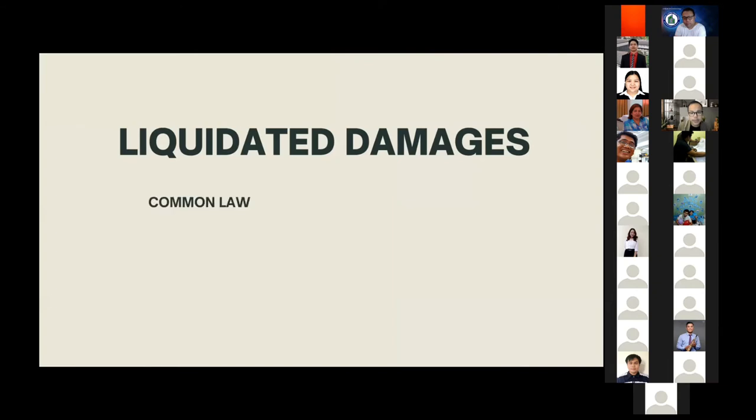And I would also like to highlight the difference between liquidated damages in common law jurisdictions and in civil law jurisdictions. Common law jurisdictions are countries such as Australia, United Kingdom, Singapore, Canada, and so on and so forth. In these jurisdictions, liquidated damages are unenforceable if the sum is punitive. So liquidated damages in a common law jurisdiction is not a penalty.